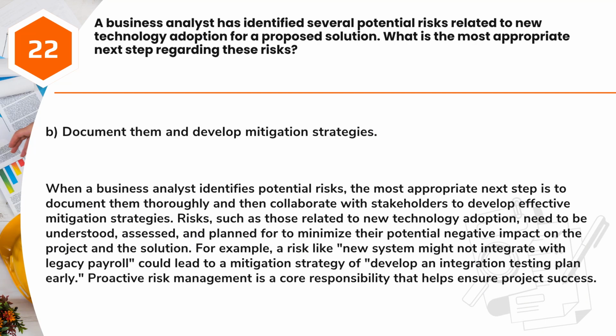For example, a risk like "new system might not integrate with legacy payroll" could lead to a mitigation strategy of "develop an integration testing plan early." Proactive risk management is a core responsibility that helps ensure project success.